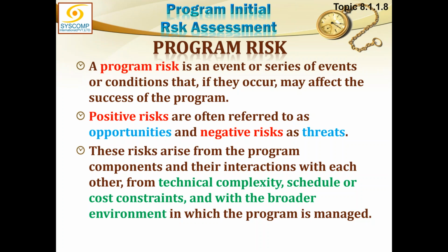Some risks are coming directly from the projects or the components, and some are due to the interaction amongst various components with each other, from technical complexity, schedule or cost constraint, and with the broader environment in which the program is managed. Here I must clarify one thing.